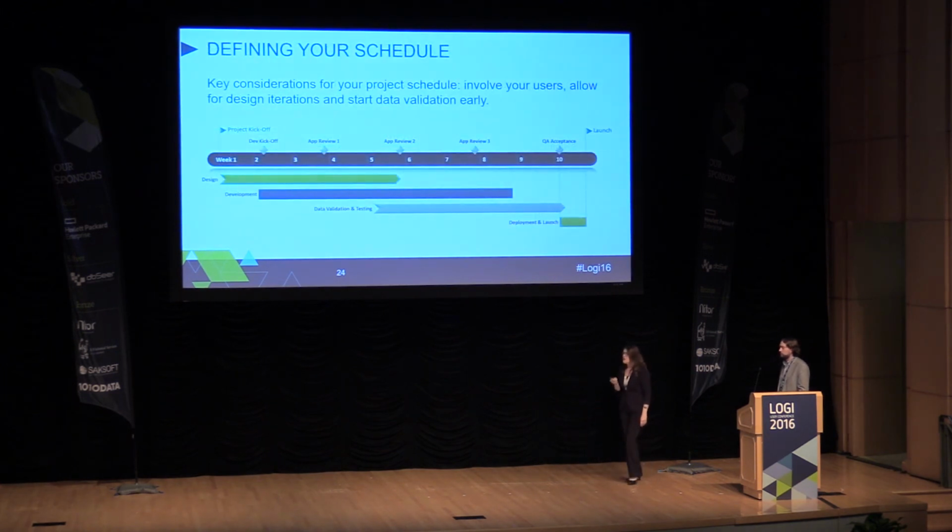Another area to consider, development schedules. As part of our blueprint delivery, we always define a schedule for our customers within the time frame constraints that they've introduced. Some things to consider here: I recommend that you keep a group of the folks that you interviewed out of your user personas as a kind of committee who can review design as you iterate on it, and also see results coming out at frequent intervals during development.